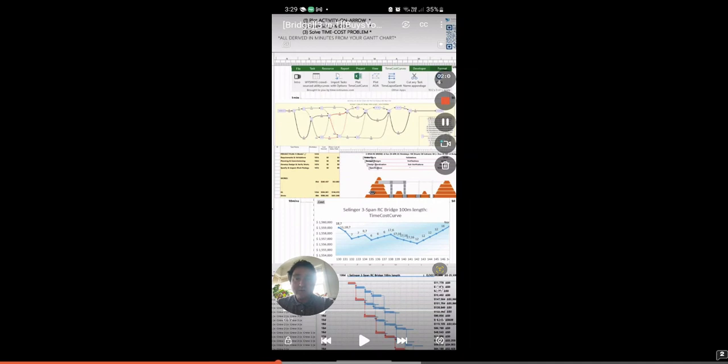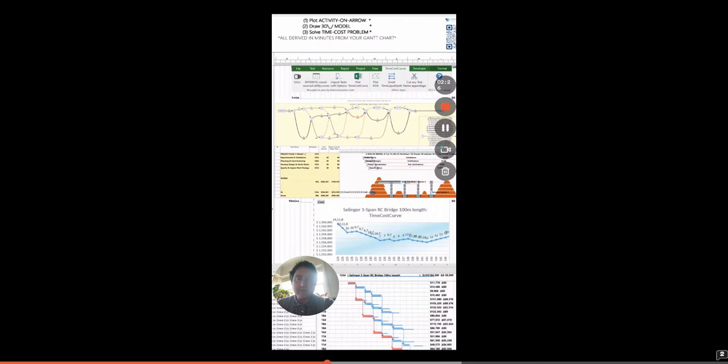We have the critical path, the bold path through the diagram. You have start date and finish date of your project, and the logical dummy activities are also included. Red is for in-progress activities at a certain status date, and the logical dummies will change if the duration of the activities change.